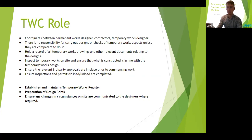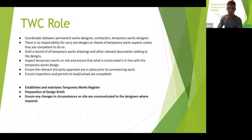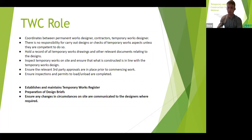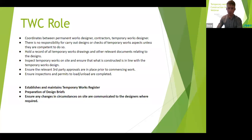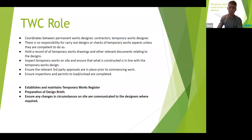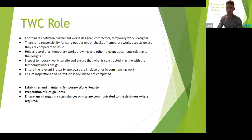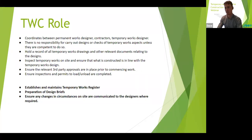They hold the records of all the temporary works carried out on site, and they carry out the inspections, the permits to load, and things Josh has just gone through in the flowchart. But from a designer's point of view, the three things that they do which are really important to us: they establish and maintain the temporary works register, which is a live document. This has to be kept up to date with designs coming in and new stuff developing on site. They prepare the design briefs for the designers to carry out the work. These are very important documents. They affect everything we do, and a poor design brief is going to result in a poor design, unfortunately. We can request information, but if the time is put in at the start to get the right design brief out, that's going to help us massively.